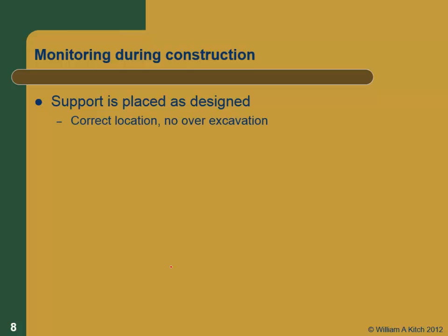Oftentimes you'll find that the contractors want to over-excavate because it's easier to place the strut when they're actually 5 feet off the ground instead of 6 inches off the ground. Or maybe they're renting some equipment and they've got it for another week, and if they don't get it excavated today, they're going to have to pay another week's rent. You don't know what the story is, but there's often an incentive to over-excavate. And if you've designed a strut based on what you think the tributary area is and they over-excavate by 5 feet, you've now put a much bigger load on that strut than you designed for.